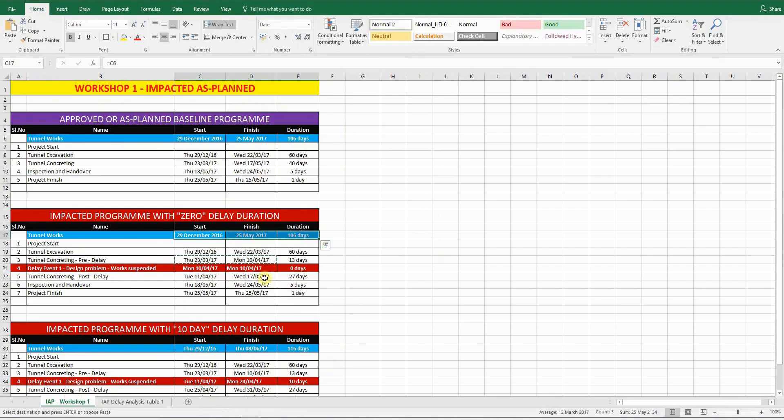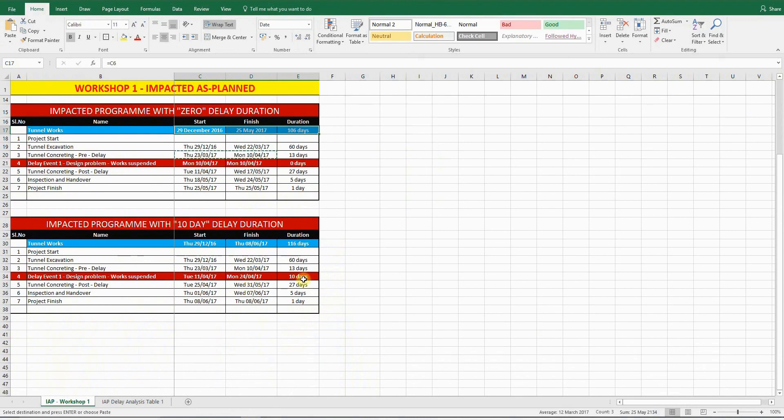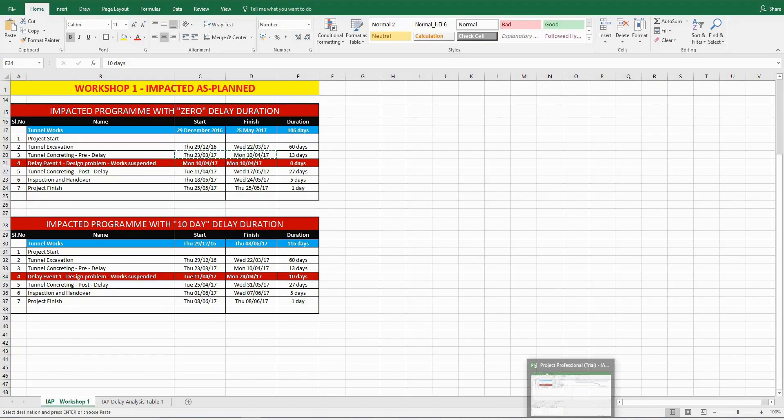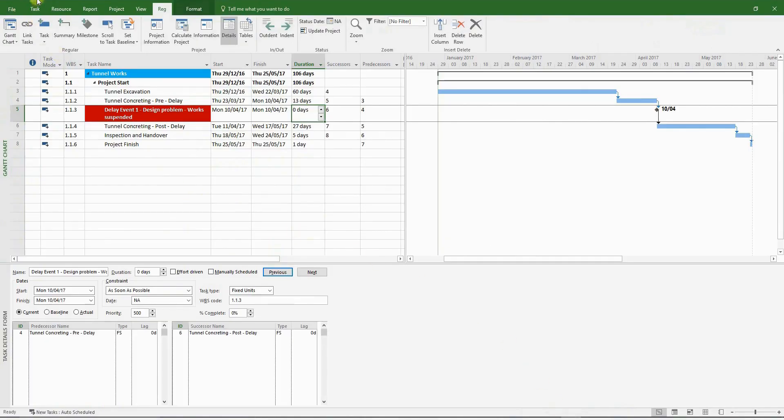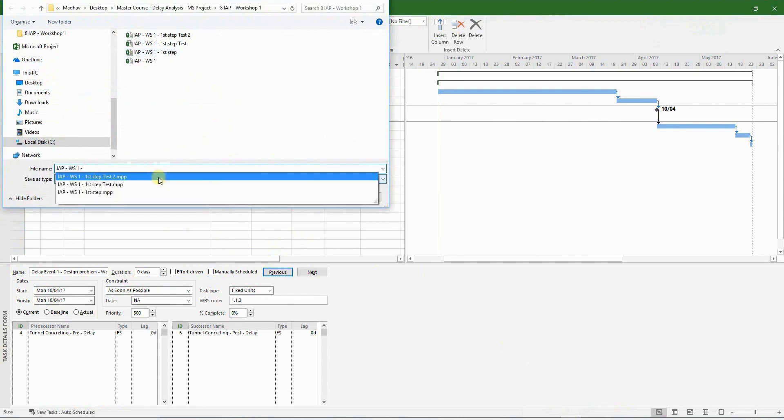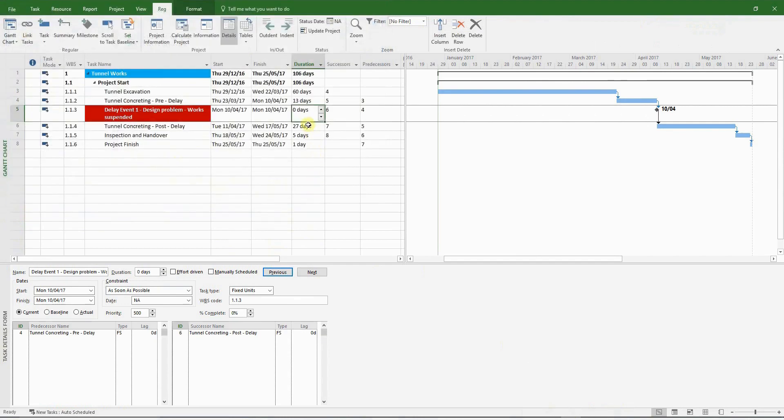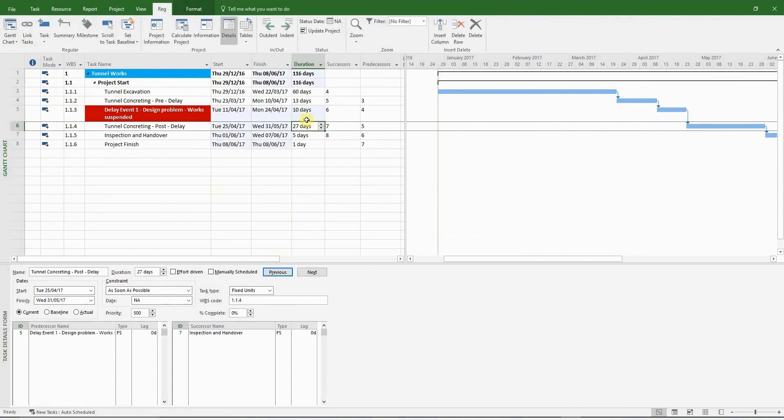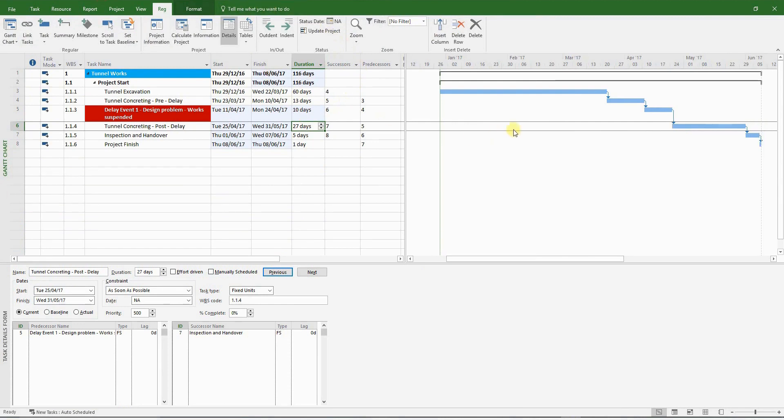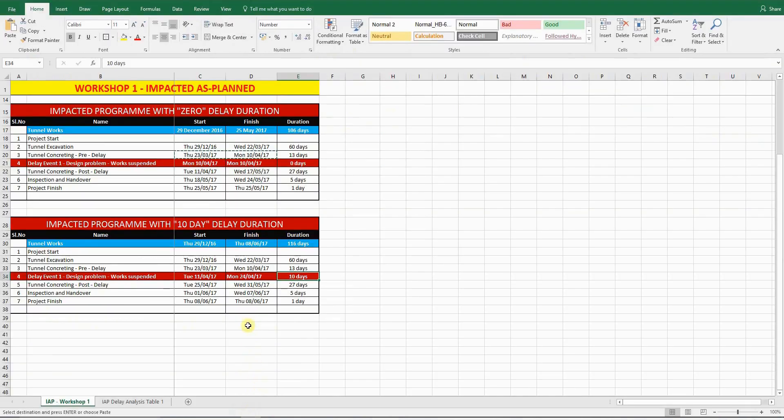Now it's time to insert the actual delay to the delay event. Just before we do that, I'm going to save the project file. So go to file, save as, and I'm going to call it second step. So now let's change the duration to 10 days. And there you have it. The original finish date has been pushed out, and the revised project duration is 116 days. This ties up with what we have here.